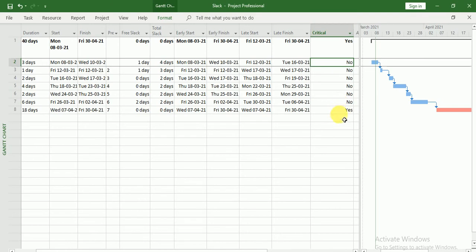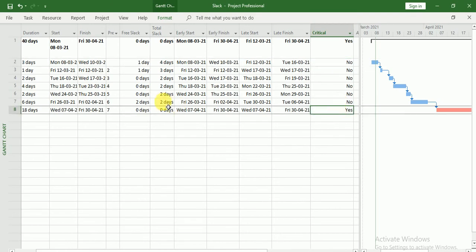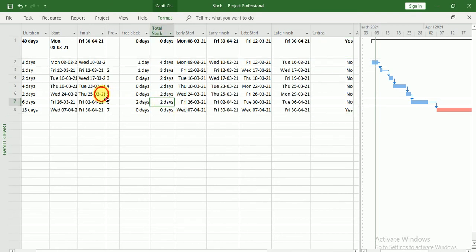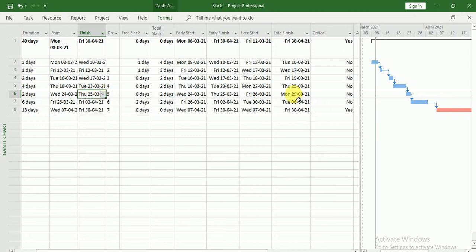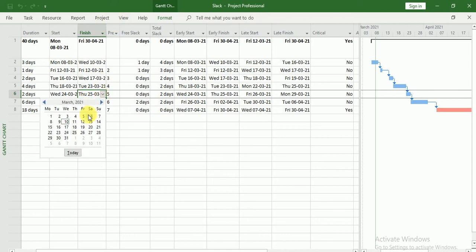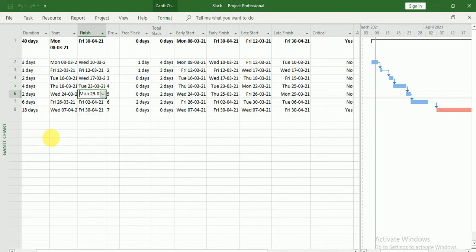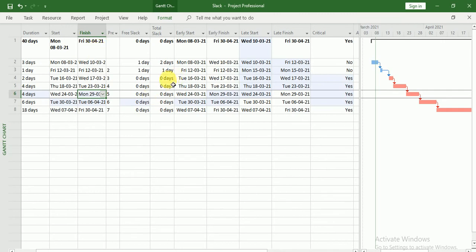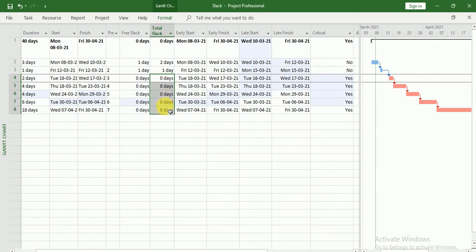So here you can see we have only one task that is critical. But now if I will finish it on the late finish, meaning 29th, then my project finish date will not be changed. My project finish date is still 30th of March and all the tasks have total slack equals to zero.